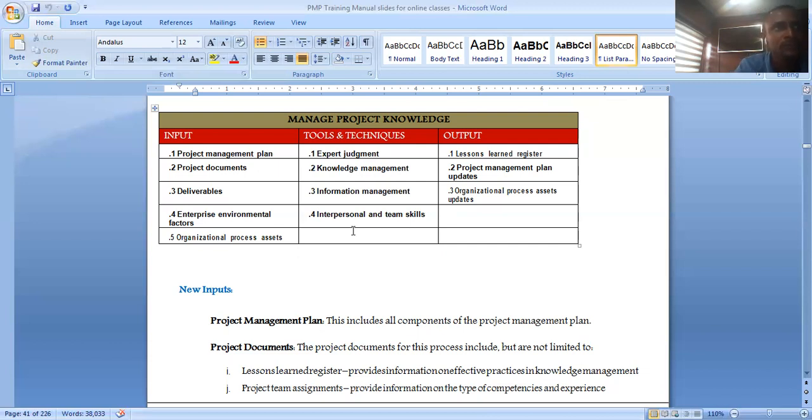What you update, you don't change the document that is signed already. But you go to the project stakeholder in a place where you would need more money, in a place where you find out that you will need more time to have a better quality and to save them more money. You have to go back to them and tell them. And if they say no, what would you do? You do it the way they want it, right? And the way it can serve them best. Yeah, that is that. Okay.